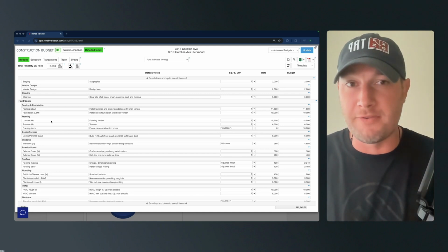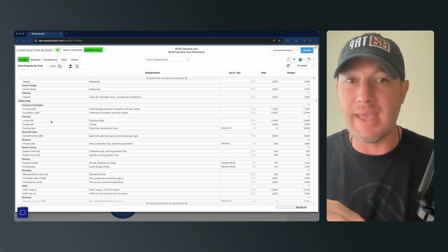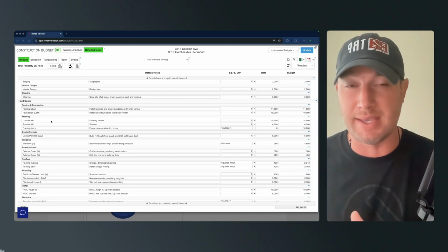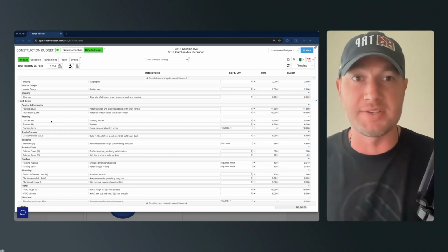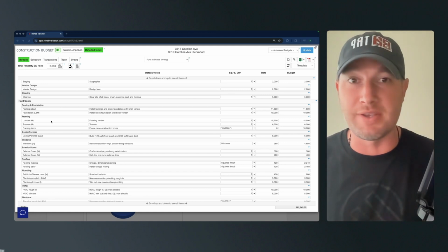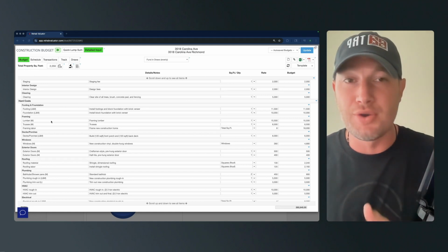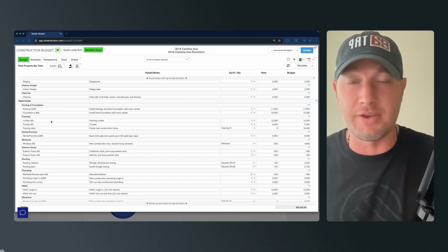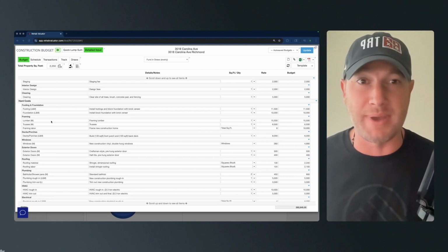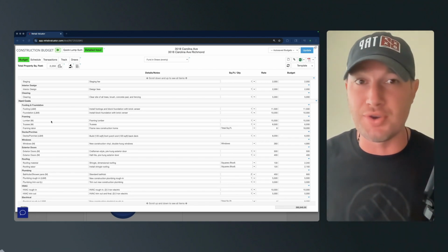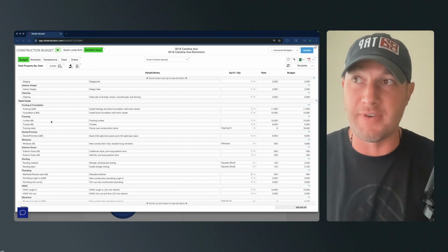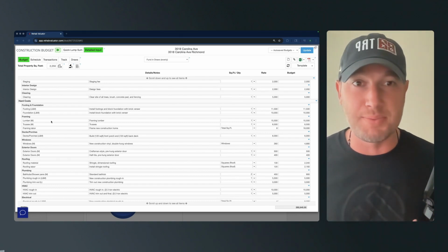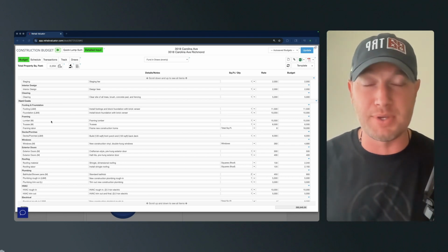When you talk about footing and foundation, every contractor is kind of estimating it differently. Sometimes they're estimating it by linear foot plus piers. Sometimes they're doing linear footage with the piers counted as a linear footage. Sometimes they're going by square footage. Sometimes they're just going by block and brick. It varies quite a bit, and it's very difficult for not only us to put numbers on it, but for them to put numbers on it.